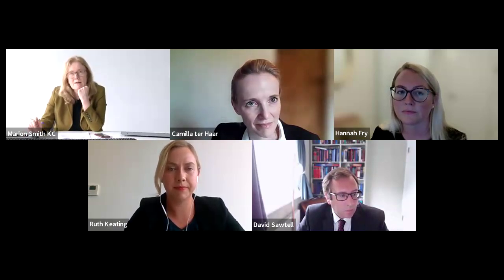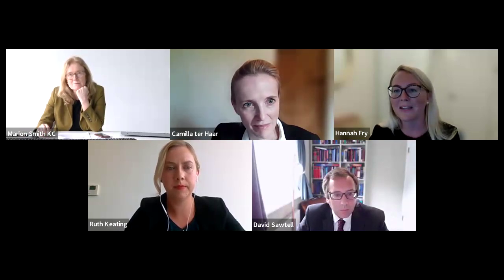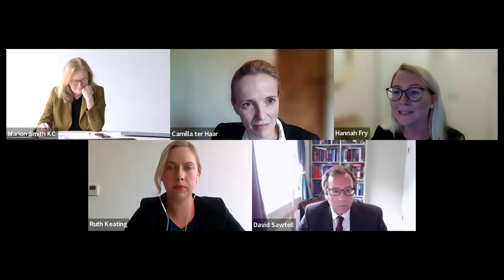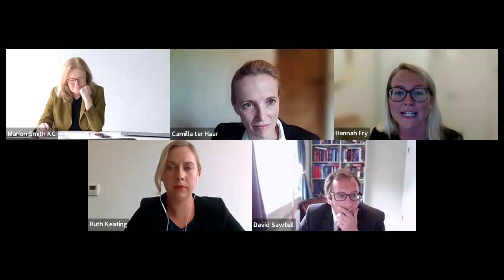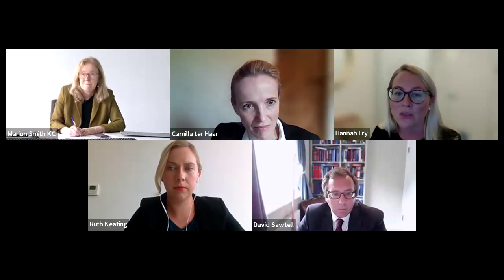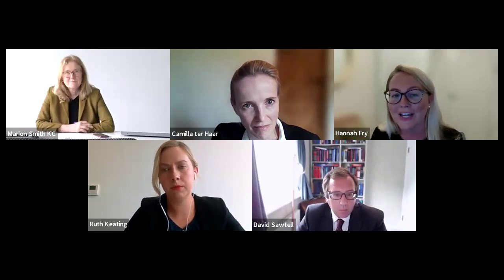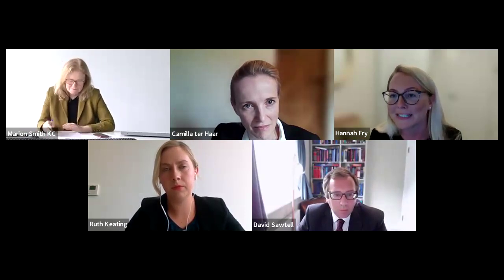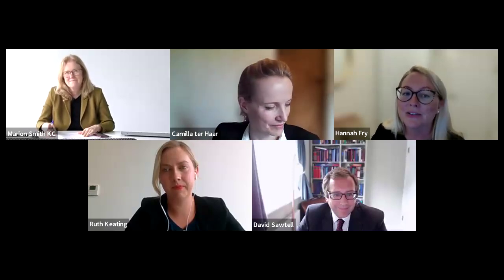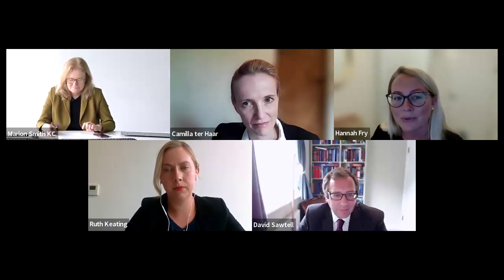More to come, Hannah. Where have we got to on topic number two, good faith? Thank you, Marion. Article 3 has now included an express obligation to collaborate in good faith. So it requires that parties work with each other and other project team members in a cooperative and collaborative manner, in good faith and in a spirit of trust and respect. Wouldn't we all like that to happen? Further, each shall support collaborative behaviour and critically address behaviour which is not collaborative.